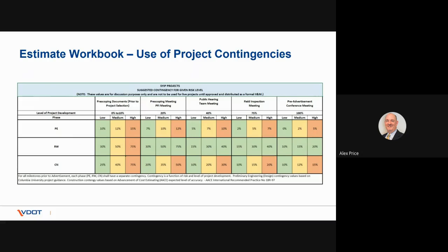Typically, for new applications, we'll need to use contingencies for most of our disciplines in the construction phase in the 40% range. In some cases, we've actually seen these percentages higher, which was directly tied to the lack of development of the project and the level of understanding of the scope of work during our reviews. So this is why it's so important for our reviewers to really be able to clearly understand the scope of work and assumptions made when developing the base cost estimates and deciding upon the appropriate contingencies.